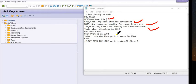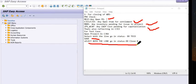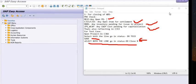For the test case, open the project in CZ02, select both line items — Level 1 (PD) and Level 2, all the WBS elements. Click on Release, go to Status, click on TECO and save. Then again select both line items, go to Status, click on Close B, and save. These are all the steps involved in closing the project.